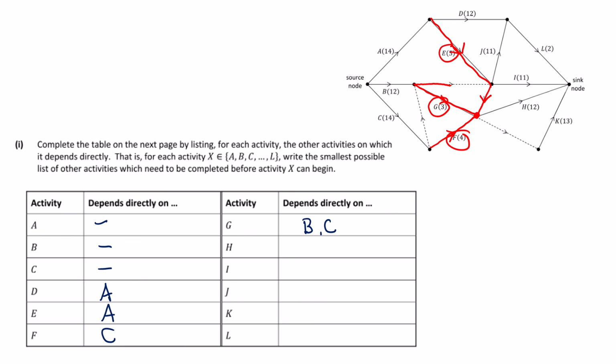And also this dummy here, which you might then accidentally go back and say, well, that's B, but actually we're not going to put B down because B is already included in G. There's no need to go back there because that dummy is not adding anything for us here going into H. So we only have E, F, and G plugging in there.